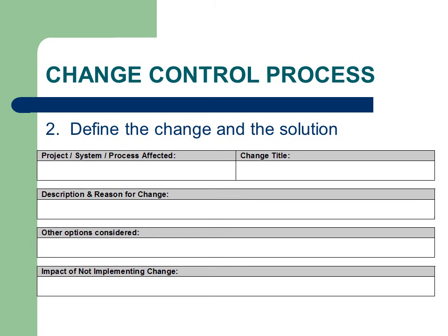Secondly, define the change and the solution. The need for the change and the proposed solution must be clearly articulated. It is important that the impact of not doing the change also be considered. It's amazing how many unimportant change requests are withdrawn when the need must be justified.